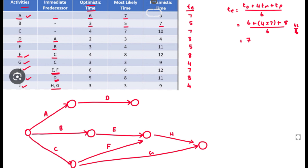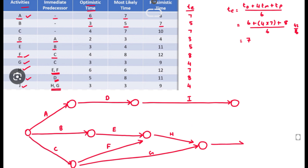For activity J, H and G are the predecessor activities. The network path was not closed, so now we draw J connecting H and G to the end node. Here is the starting point and here is the ending point.